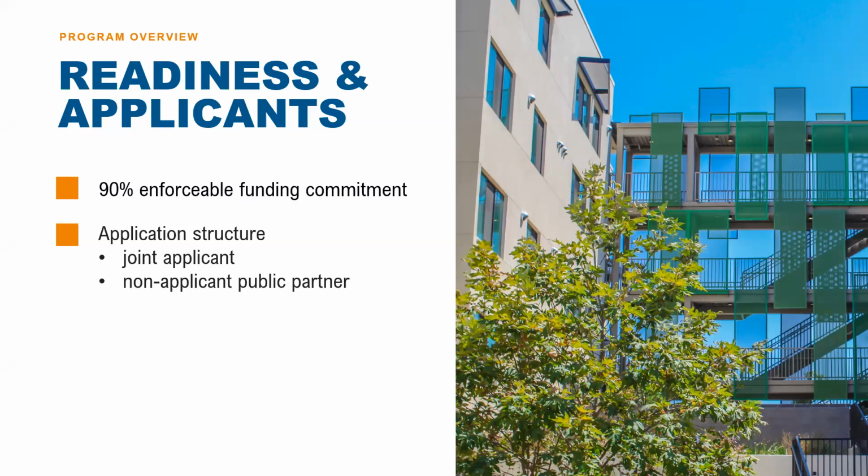Most ASIC applications, in our experience, include the housing developer and the local government as joint applicants on the ASIC application. All joint applicants must submit a resolution, so keep that in mind in your timeline if your city council or board of supervisors has a busy schedule. Transportation agencies sometimes ask if they have to be joint applicants. The answer is no. A transit agency may be a non-applicant. In this case, an executed agreement with a transportation agency may be provided for the completion of their components of the ASIC application.